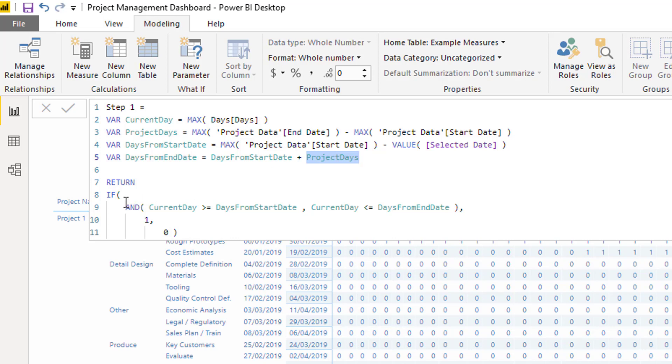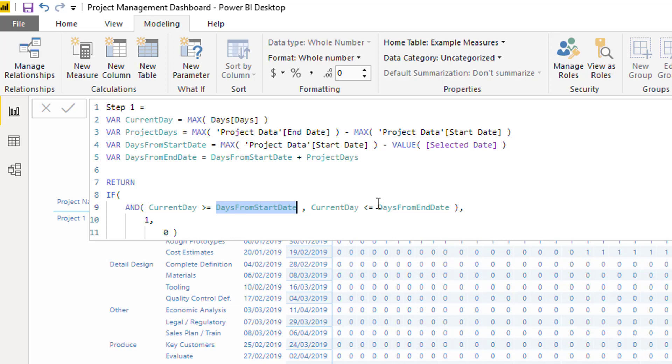Then I'm creating some logic under the return. I'm saying, is the current day, is the current day, so the number, is it greater than or equal to the days from start date? And is it less than or equal to the days from end date?